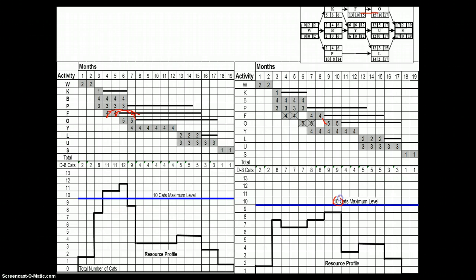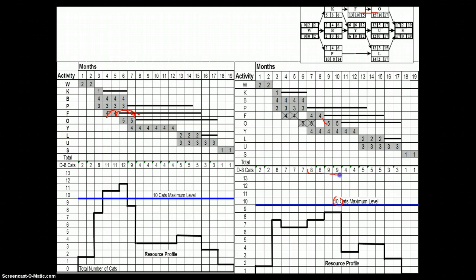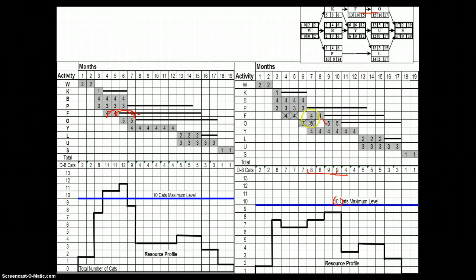It is also possible to explore further options. For instance, you can still identify the peak requirements starting from month 7, which is 8, 8, 9, 9. You can still further explore the possibility of using the float time to further reduce this, and possibly try to deliver this project with a maximum of 7 caterpillar machines.